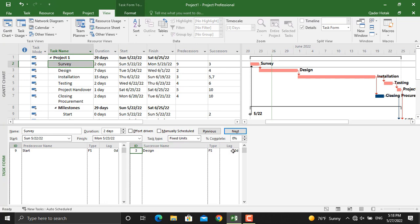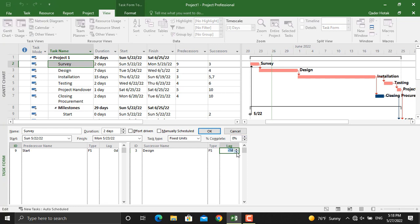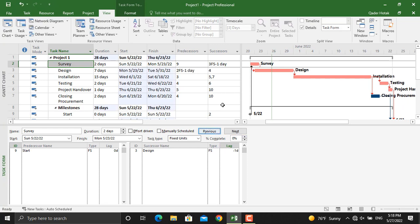On the right here, as you can see, the lag is zero days. So if you increase this lag to a positive number it will be lag. If you decrease it to a negative number it will result in lead. For example, let's make it minus one day, click OK, and as you can see the design activity came forward by one day.